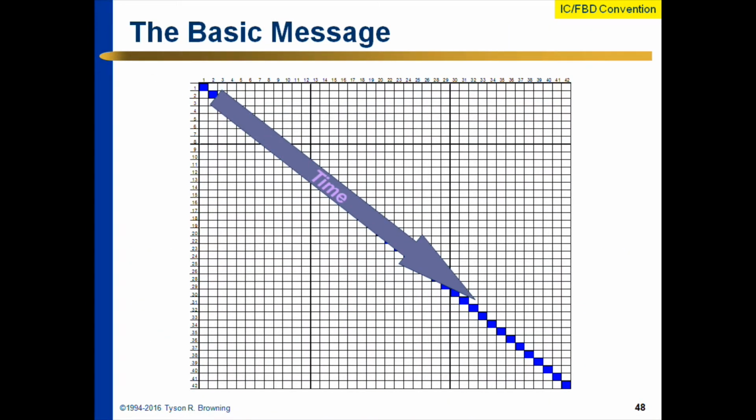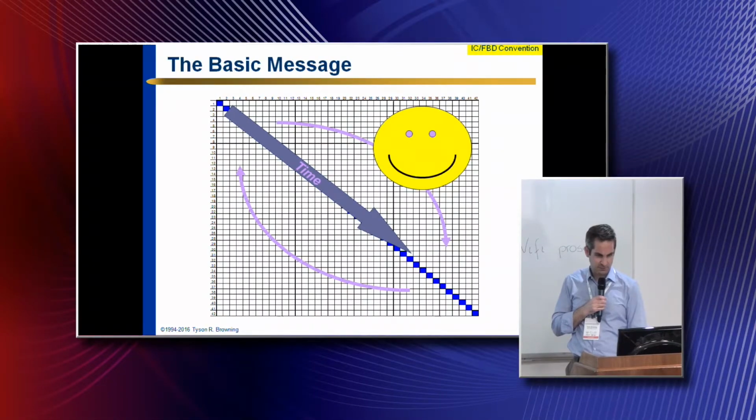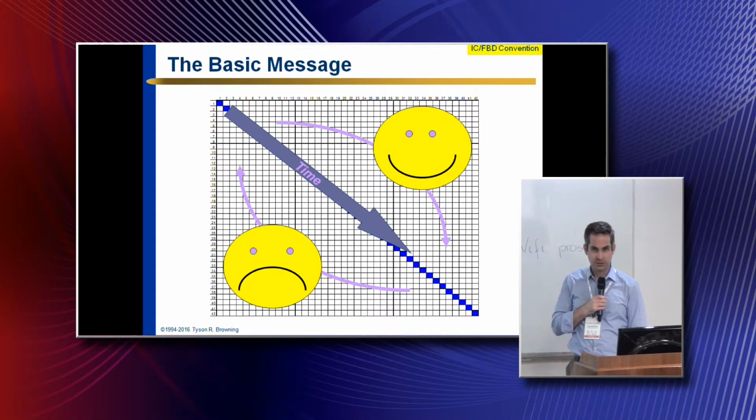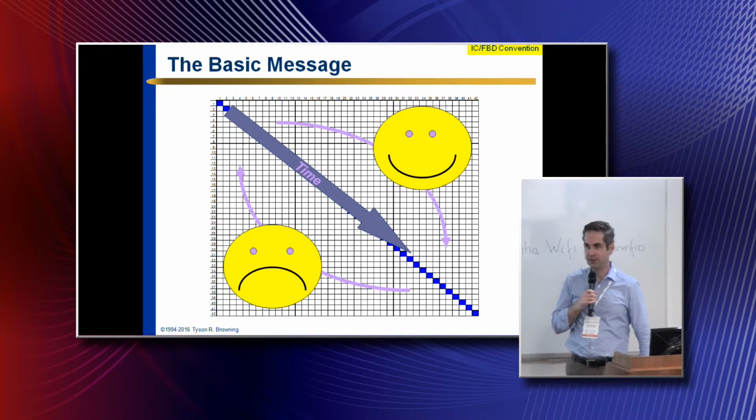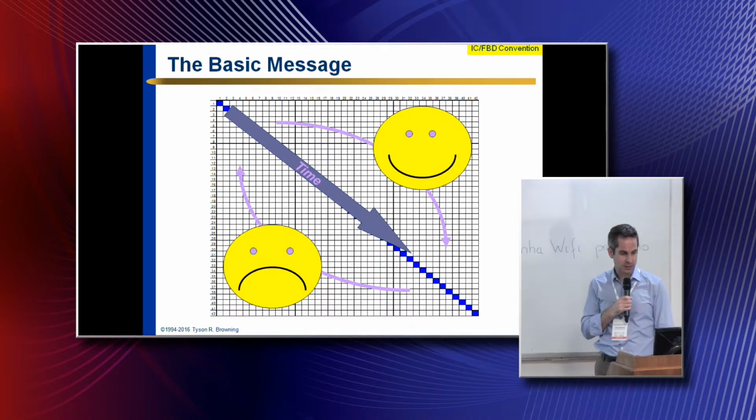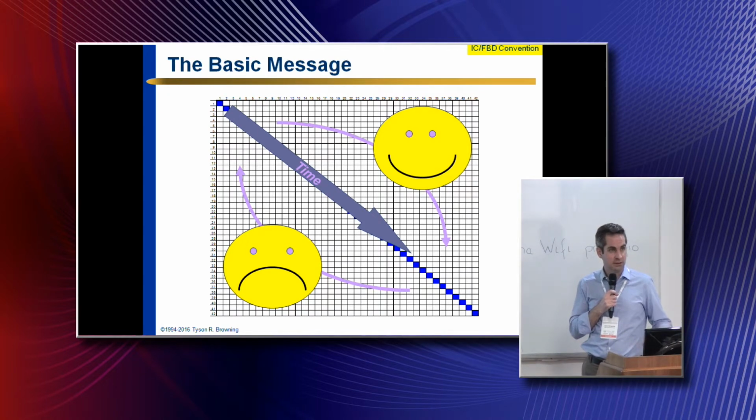So here's a basic message. I call this the executive version of the chart. So try to not have these problematic feedback marks that represent rework. Often it's unnecessary. Often it's an artifact of just doing the work in the wrong sequence, making decisions in the wrong order, or something like that. Solving your system of equations without starting with the right variable.